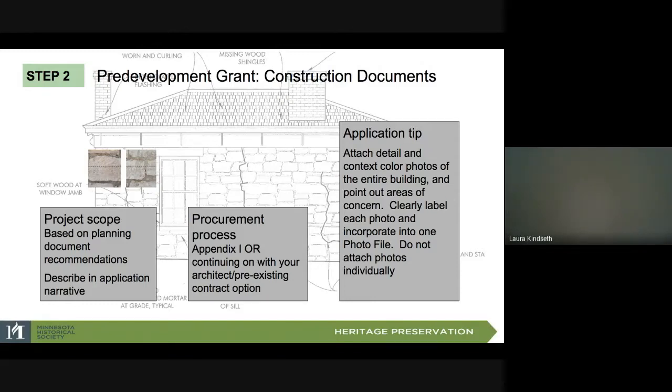of the project. If you are phasing recommended work, be sure to clearly define your phasing plan in the narratives and ensure that your architect has delineated phases in the drawings and scope of work form to clarify for reviewers.